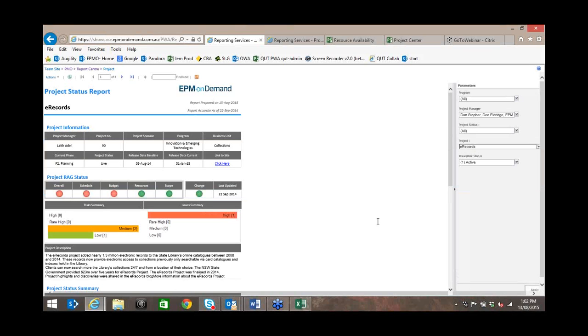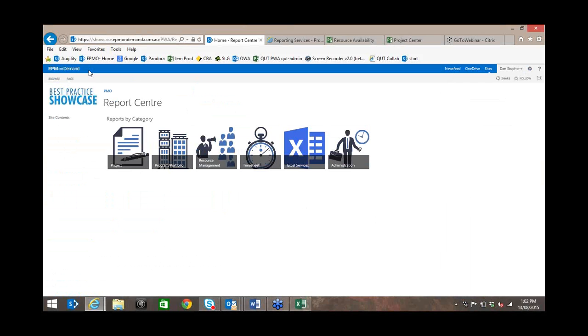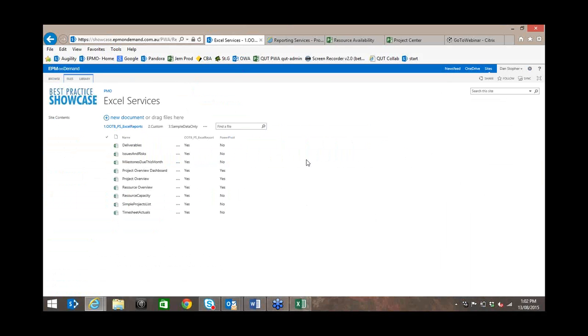The third item that I'd like to now look at is the Excel services reporting technology. And a lot of attendees will be keen to know that Excel services reports do actually come out of the box. So when you install Project Server, the reports that I'm about to show you are there. The previous reports, the SSRS reports, obviously were developed by, in this case, EPM partners, but these reports do come out of the box. So let's look at a couple of simple ones.